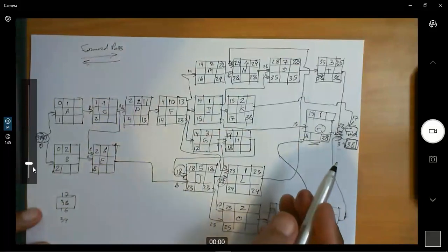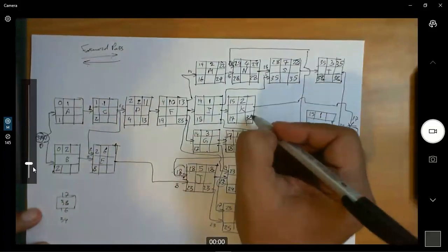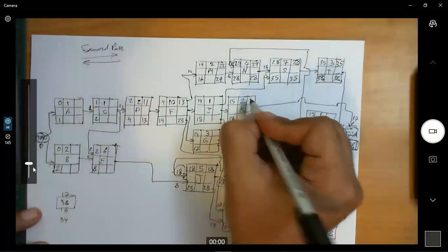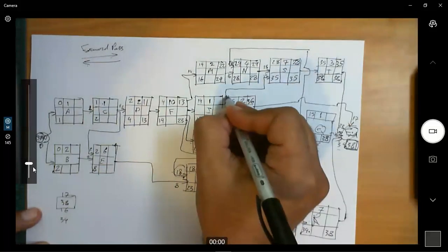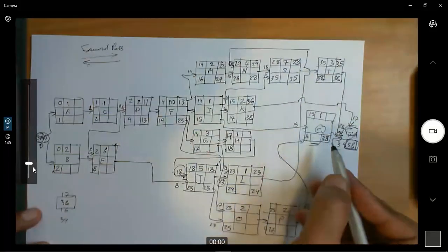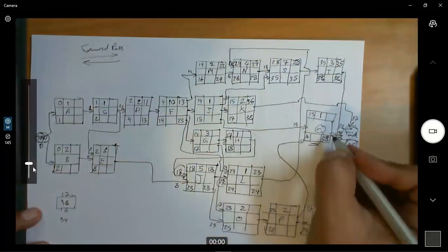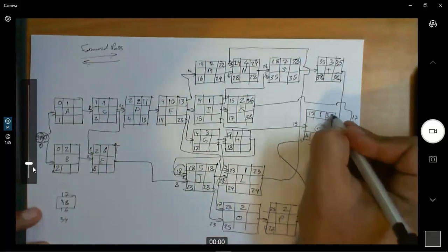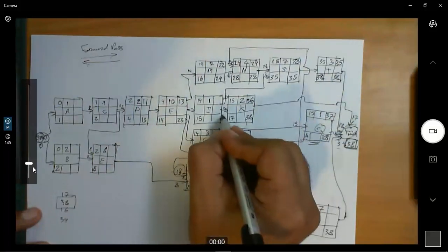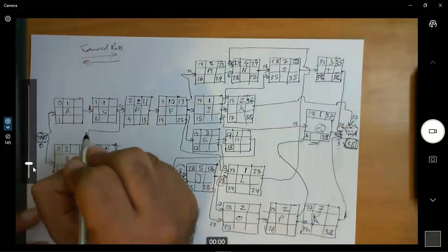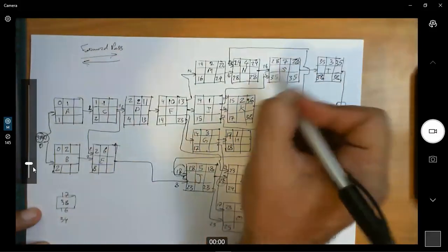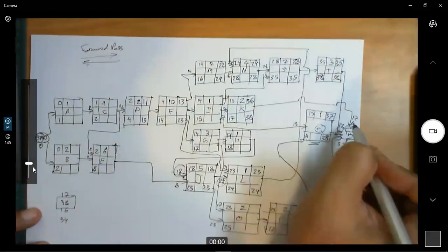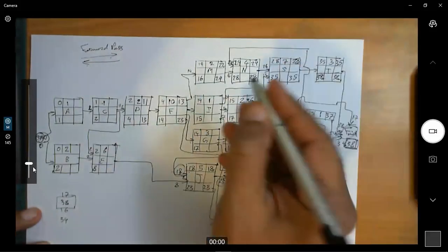Then where we go for, okay, here 38 minus 2, that's 36. So we have here 36, and we have here 28, and from here, how much? That's okay, 38 minus 1, 37. So we have 37. Which one do we take? This arrow giving us 28, this activity giving us 36, this activity giving us 37, we take the lowest one. So we take the 28.